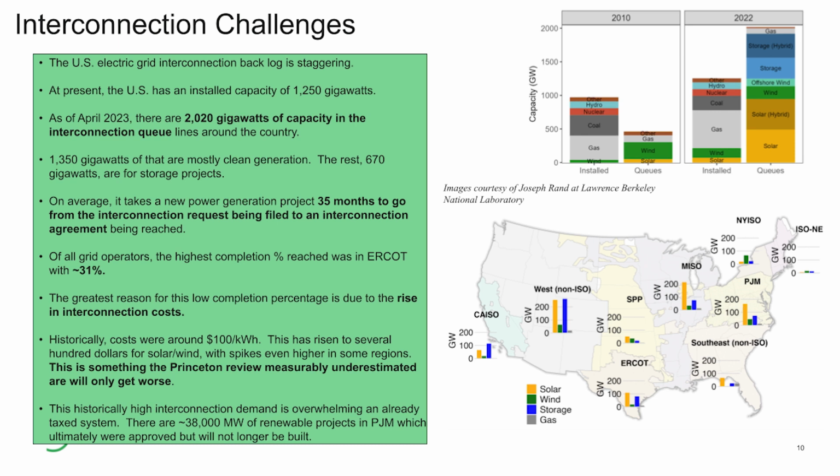So what that is, if you want to go and build a big solar farm and you want to hook it up to the grid, you have to submit some paperwork within your region and the governing authority to say what you want to do in your project and the metrics around it. And then they have to study it, sign off on it, and agree to it. And that's the interconnection process, right? Going through that approval process to be able to actually develop your project. Then you get to break ground.